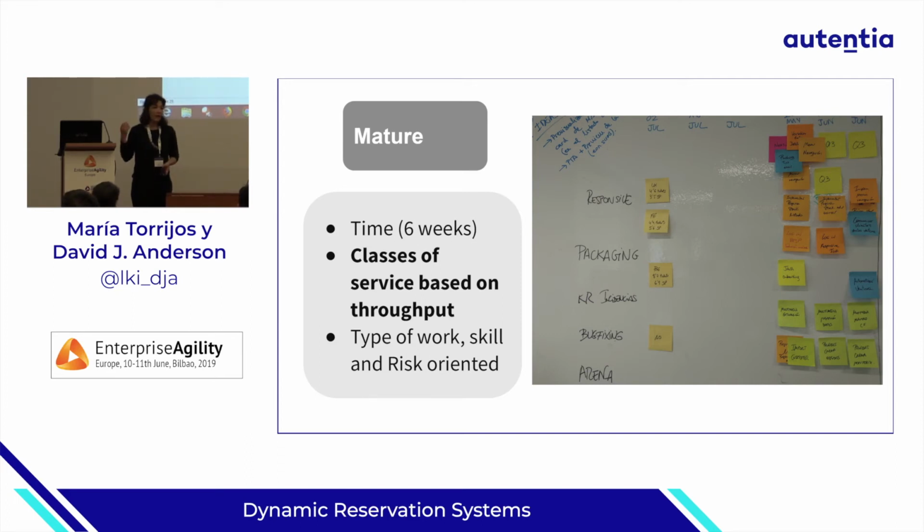when I started presenting this model, the front end came to me and told me, listen, I'm not able to deliver 15 stories per week. This is not true. Maybe the front end tasks are 2-3 items per week. That's true. So that's why we need to create that additional level, which is the type of work.